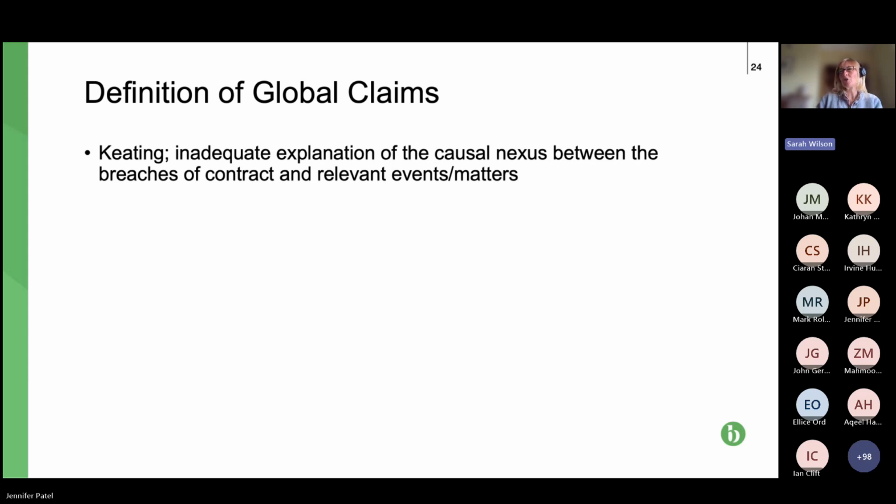So you can't just say, we had bad weather that entitles us to an extension of time. And it was during this period, so this is the critical delay that it caused. It might be that you've got lots of different causes, but all down to, or all at the risk of the paying party. So next slide, please.